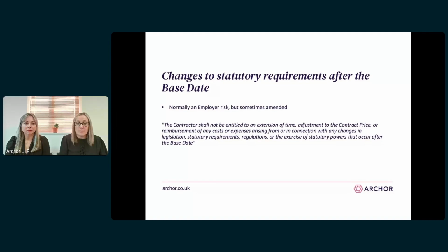This clause as shown on the slide would effectively mean that if the law changed or if a planning condition changed after the base date, the contractor would have to comply with that change at no extra cost. This is always something that we recommend remains an employer risk, and it's standard in the market for this to remain an employer risk, even if the contractor has otherwise taken full design risk. So do keep a lookout for these types of clauses.